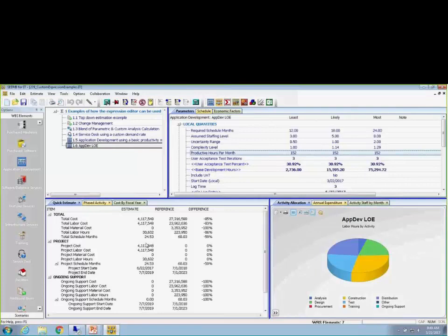You're going to have hours, you're going to have project hours, a schedule, and this is going to be brand new. And what's driving that are these local quantities. So there are these new parameters now that are basically going to be created based on those knowledge bases that you've selected. And if you need to adjust them, you can. We specified our desired schedule. We put in our assumed staffing level. But if we needed to now, we can change those.